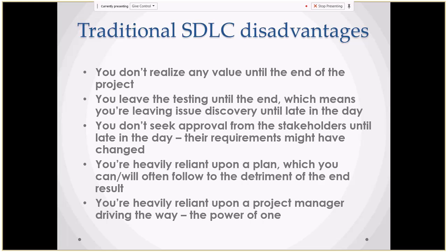So that's one disadvantage, and of course you leave the testing until the end, because we do the testing even after the implementation. So at the end, you don't realize what has gone wrong. You discover the defects, most of the issues, at the end.